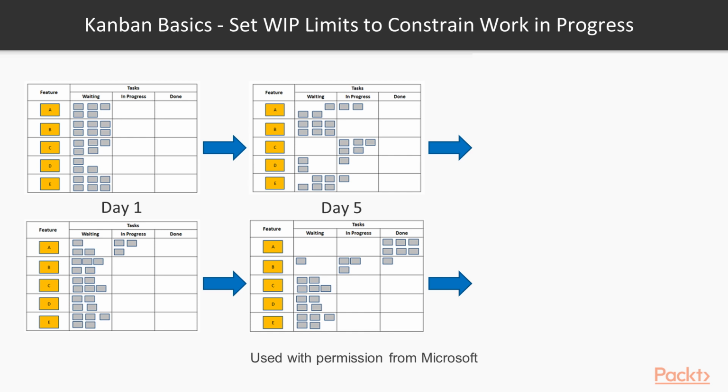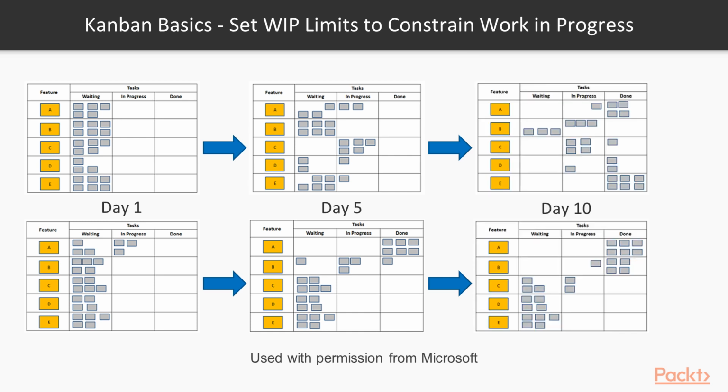So we've now got 3 work items, but we've got a completed feature, whereas the top, we have no completed features, and we've got a huge amount of work, different features, all being implemented at the same time. So what happens when it gets to the 10th day? This is traditionally when people do set their 2-week sprints. If we look at what the top team's done, they've managed to deliver E, but E's the least valuable item based on priority, and they're still halfway through most of the other activities. And some are done, some bits aren't. So this is a real problem.